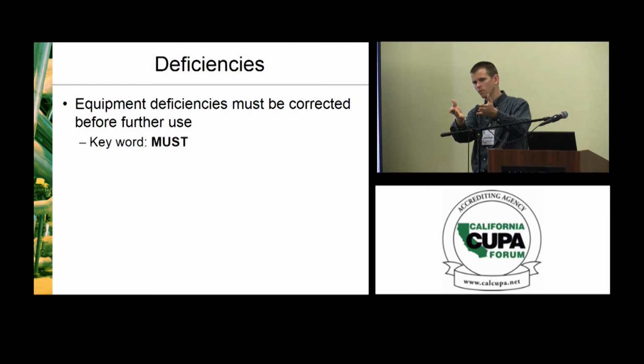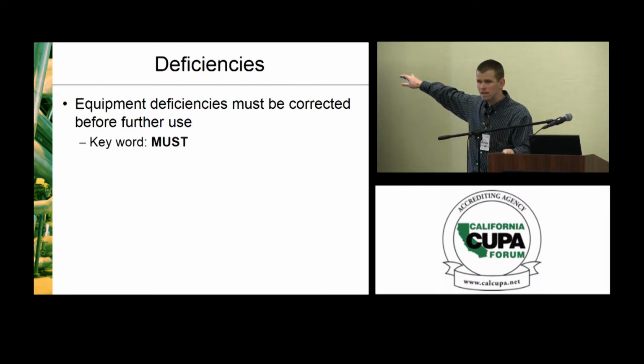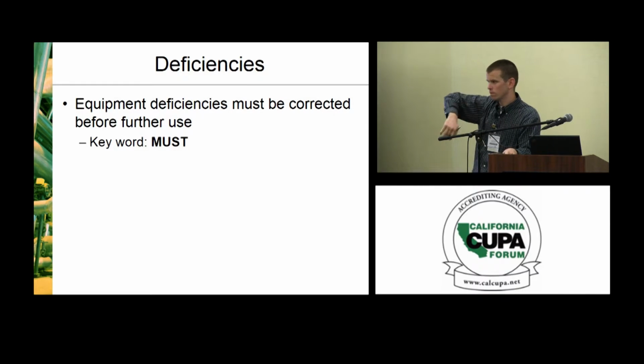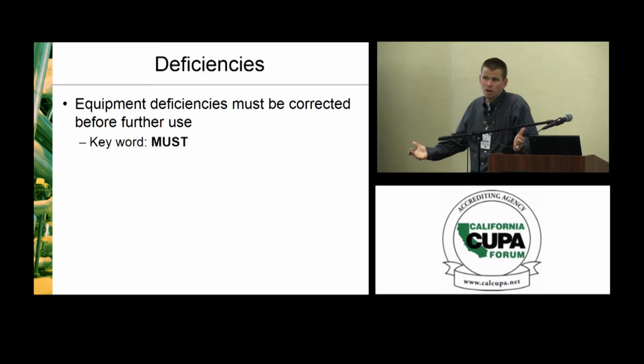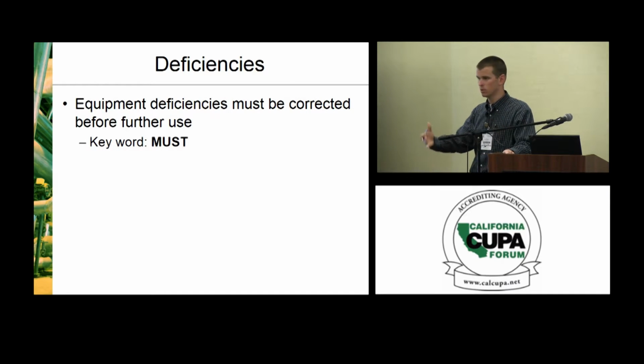But the other thing I want to say about this too is that when a recommendation is made, it should have a timeline on it. So, yes. The PHA has to have a due date. And I say the same on any recommendation. I don't care if we're even talking CalARP or not. If you're going to recommend something and you're telling them you have to do it, we will all work on a time schedule. We need to know when we need to do it by.